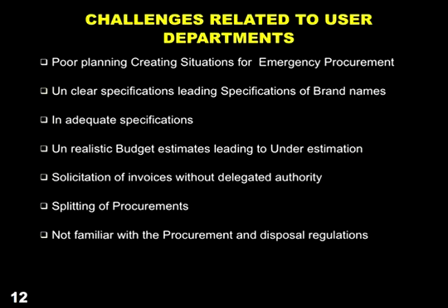You may not know it. You don't need to know the price. You need to get the price from your budget. Don't you do budgets? So you get the price from the budget. And what you have on the Form 5 is an estimate. It's not actual. Do you agree with me? It's just an estimate that is on the budget, it's on the Form 5. So it's not a must that what is on the Form 5 is what you receive from the provider. What we have on the Form 5 is just an estimate. Try to guide us.